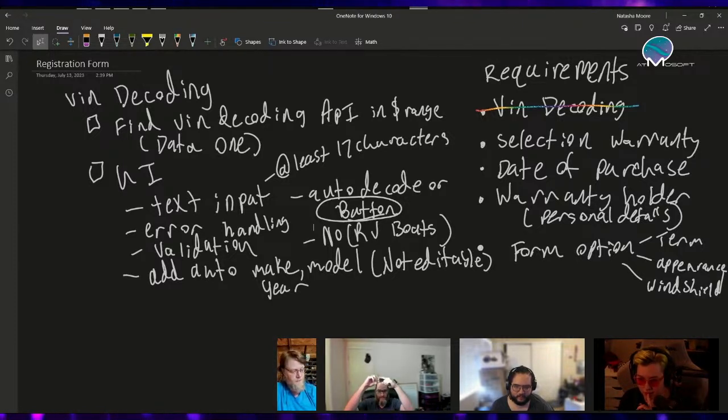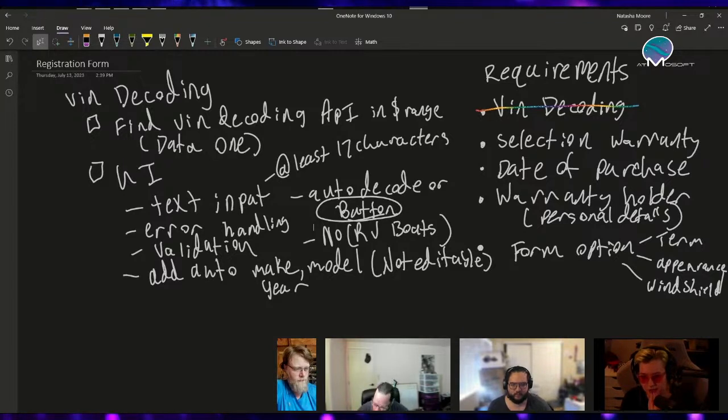We do this: 0 and 1. 1 plus 0 is 1. 1 plus 1 is 2. 2 plus 1 is 3. 3 plus 2 is 5. 5 plus 3 is 8. 8 plus 5 is 13. And that's what we're measuring here, complexity with a scale up like that. So, exponential. Yeah. So the UI and wiring up to that particular API provider.